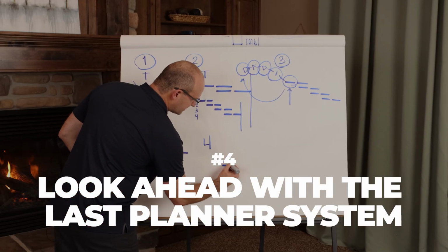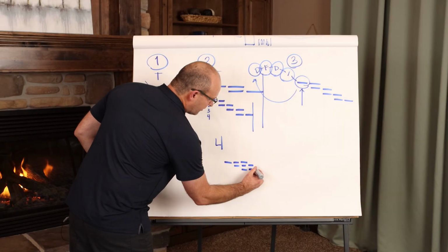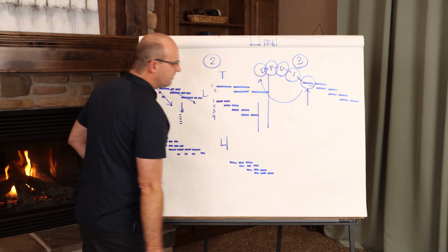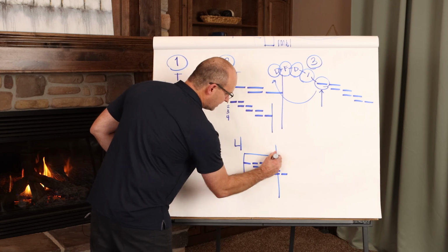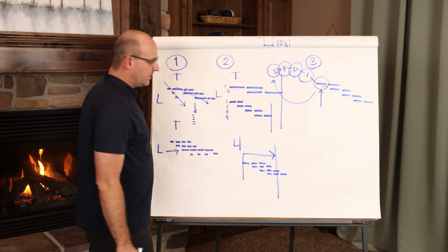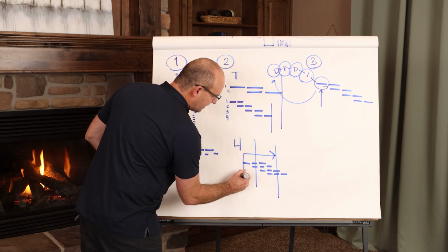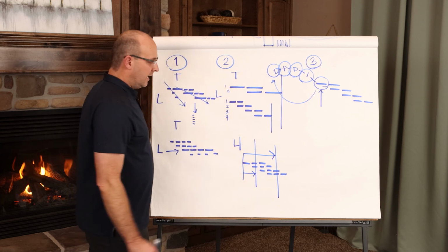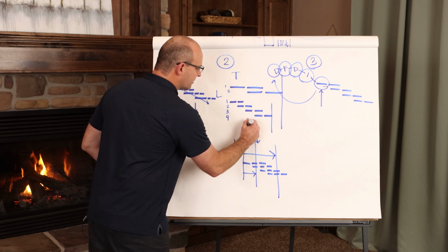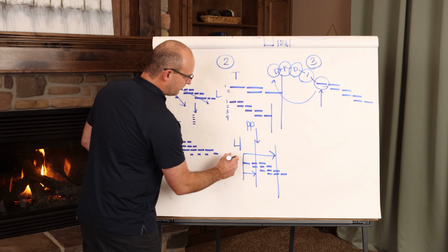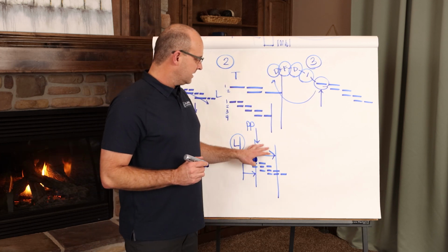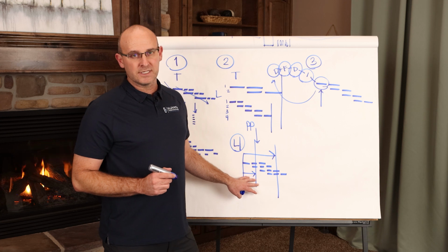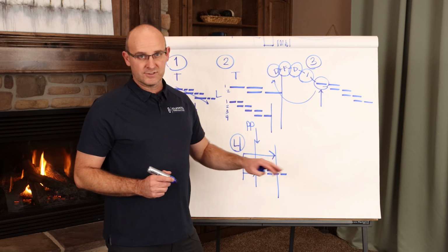In the Last Planner System, if you have your production plan, which is going to be represented as a takt plan, if you look out ahead 6 weeks to find and remove roadblocks ahead of time, and if you do weekly work planning a week out, and all of this is from an actual pull plan that was collaborated with the trades and coordinated with the trades, this will do more to speed up your project by making work ready than almost anything else.